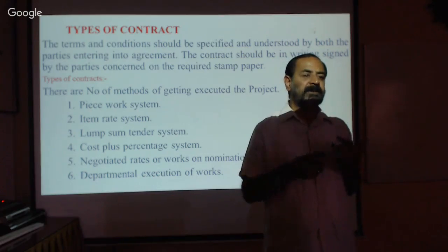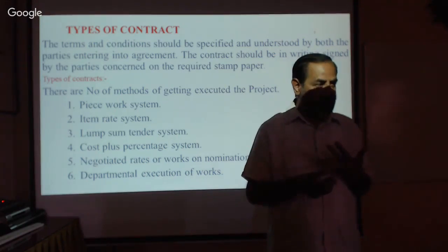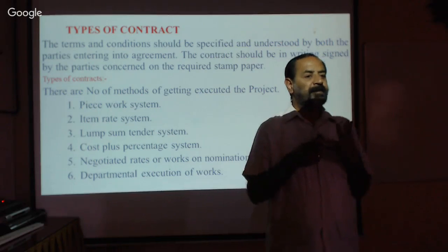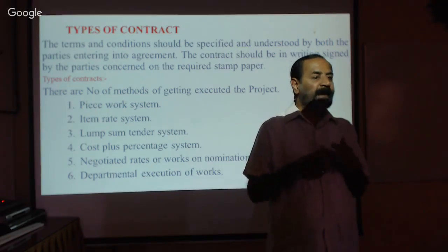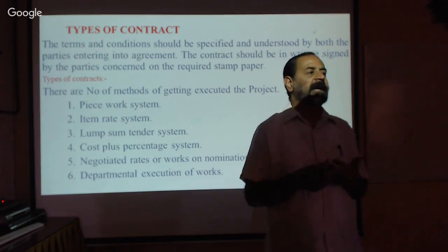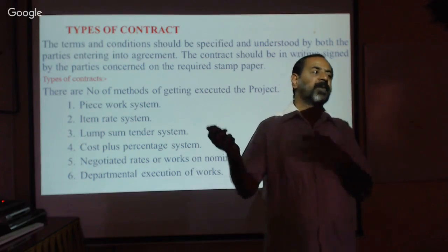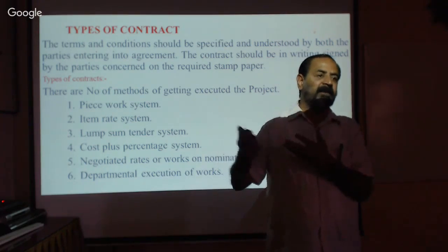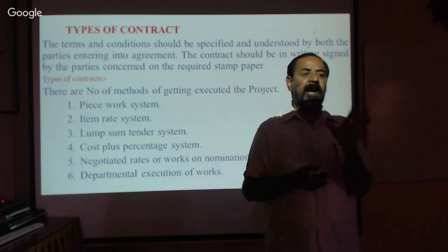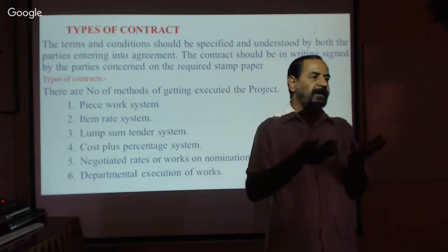Now the schedule of rates is prepared based on the material available, is it not, locally available at the site, and the people available around the site, and also the machine available around the site, and also the material available, whether it is transporting from far away places or locally, now the rate will be calculated, is it not? Schedule of rates the department will announce, is it not?